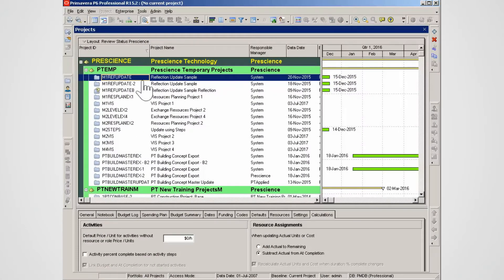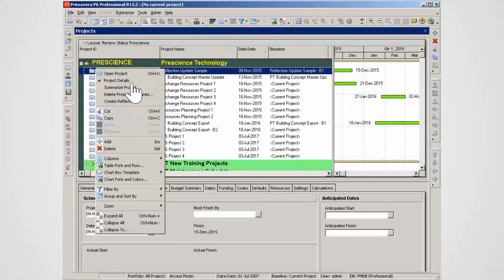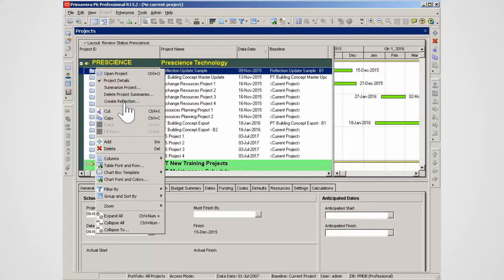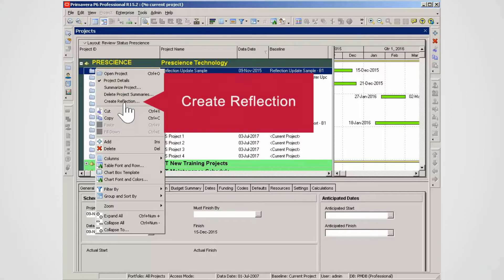Reflection projects are linked clones of the source project. Highlight a project. To create a reflection project right-click on the project and select create reflection.